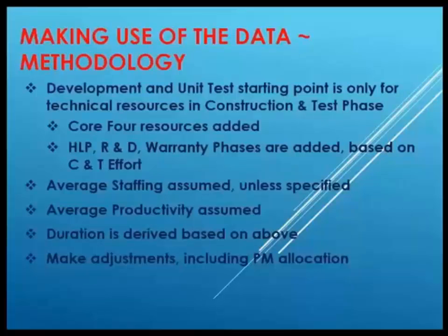So the development and unit test starting point, that's only for the technical resources, and then in my organization, we add on what we call the core 4, which is the project manager, the technical solution owner, the requirements analyst, and the quality assurance analyst. So those 4 are actually added on. And of course, we build on the other phases too, like high-level planning, requirements and design, and the warranty. So we start with that construction test, and then we build all this up and around it.